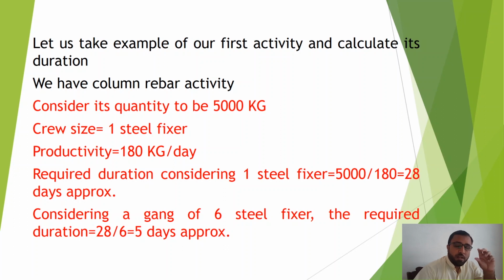And one thing you must keep in mind is that we are bound by some milestones to finish our works, because this duration is driven by time, not by the resource. So we have been given contractual time, for example 1 year, to finish that project. So whatever resources we need to finish that job, we need to put those resources. But it doesn't mean that, for example, we will put so many steel fixers for one job.